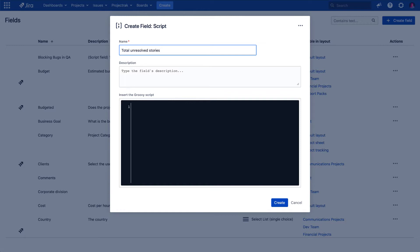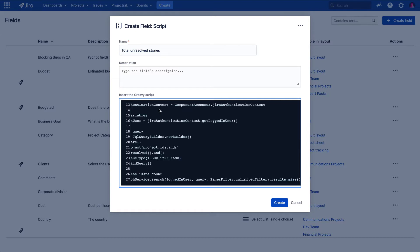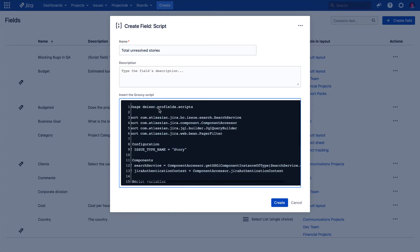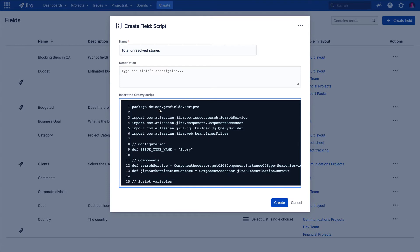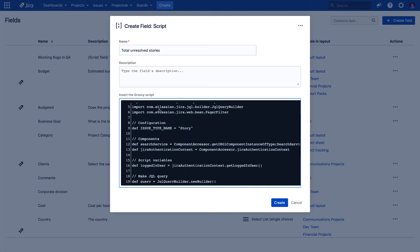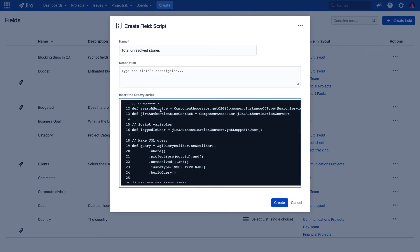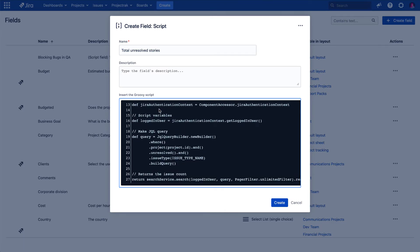The following step will be to insert the Groovy script. In this case, we will show you how to get the total of all those issue story types that haven't been resolved, by using a script that is available from the Project Track Data Center documentation. We copied it, pasted it, and then let's create it.